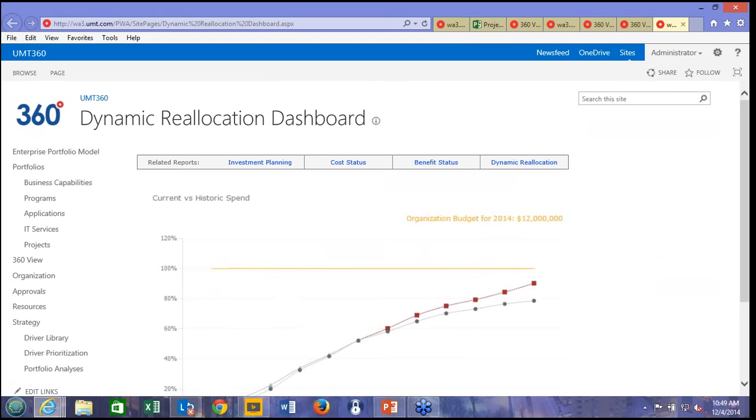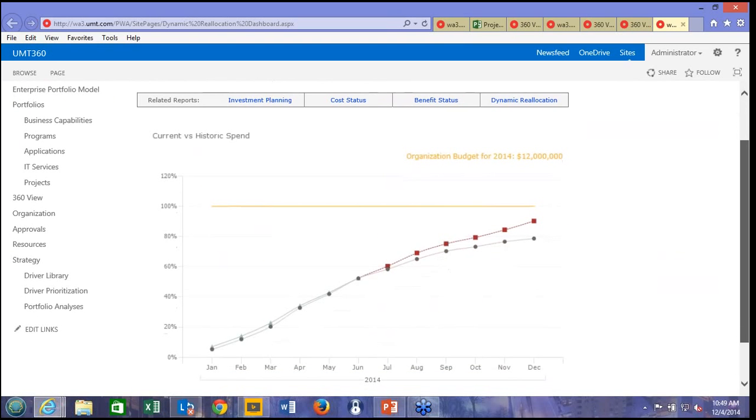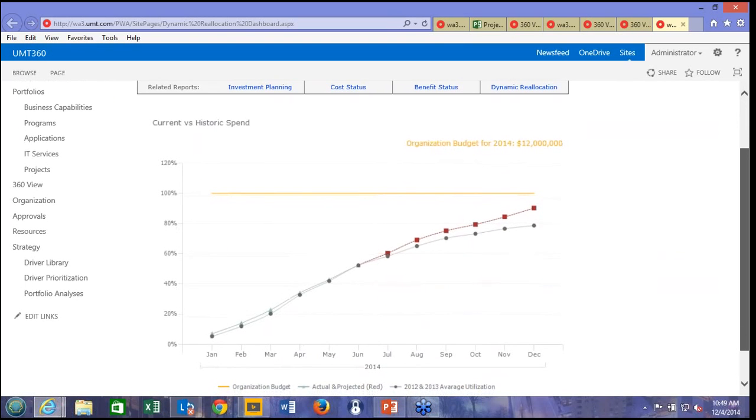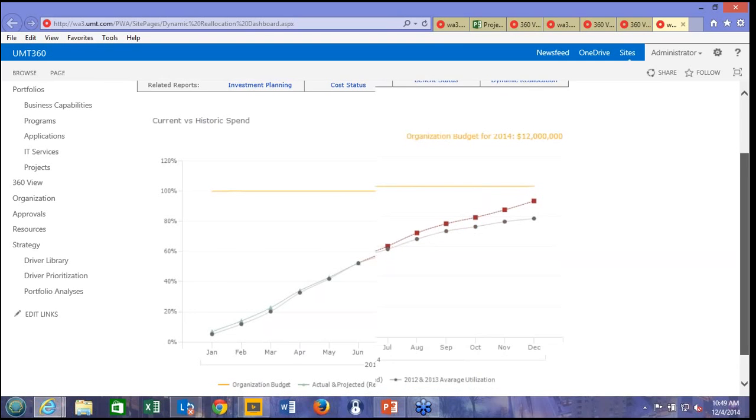Other organizational intelligence that you'll be able to derive is things like better forecasting of spend. This is a great view, an example of how you can benefit in year 2, year 3 from the information that's being captured. The top line here simply represents the spend pattern for this year, and you always see a spike in Q3, Q4 from a forecast perspective. But the bottom line here represents the historic spend pattern, showing there isn't that spike. So you can do a better job of communicating to departments, look, I don't think you can spend that much. You never have. Historically, you've always been fairly flat, right? And start to do a better job of predicting where the actual spend will result at the end of the year.